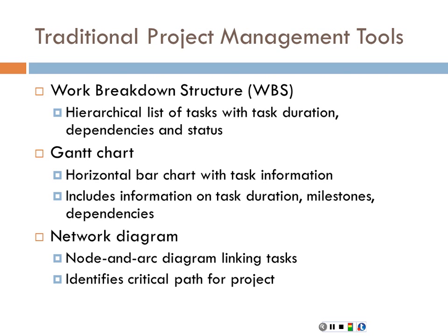Each one has a task ID. You enumerate how long you expect it to take and when you expect to start. And then within each one, you outline at the top the timeline and who's responsible for that specific task. So that's something you're going to want to go through as a group in defining what needs to be done and who's going to do what by when.